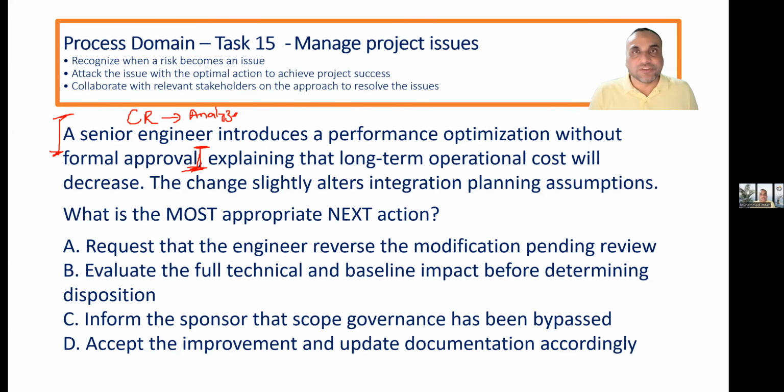You will initiate a change request, then start evaluating. It means you as a project manager will file the change request and evaluate it. Then, based upon the impact, you will submit it to the change control board or the relevant governance authority for approval. So please fix it in your mind so you don't repeat those mistakes you just made in the chat.